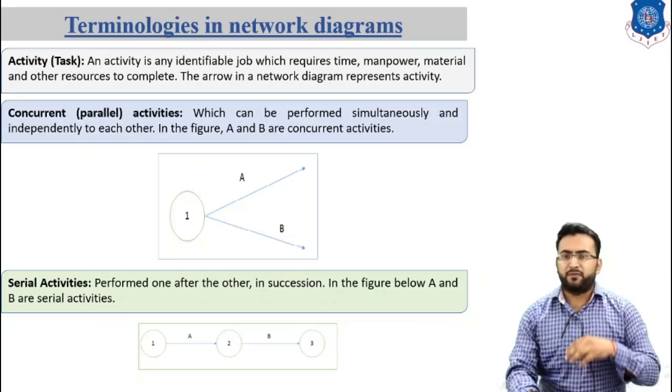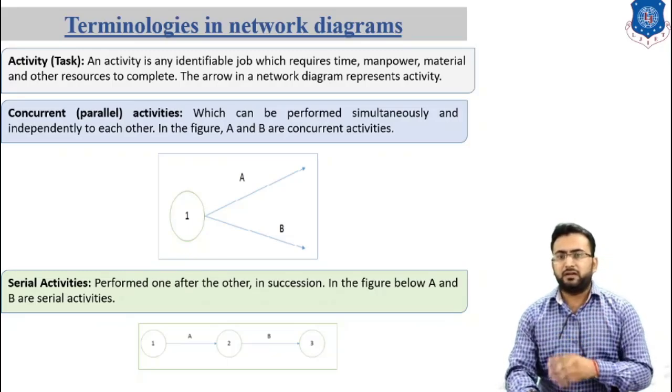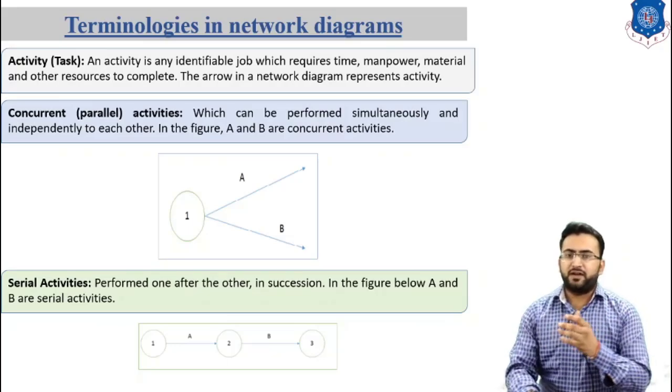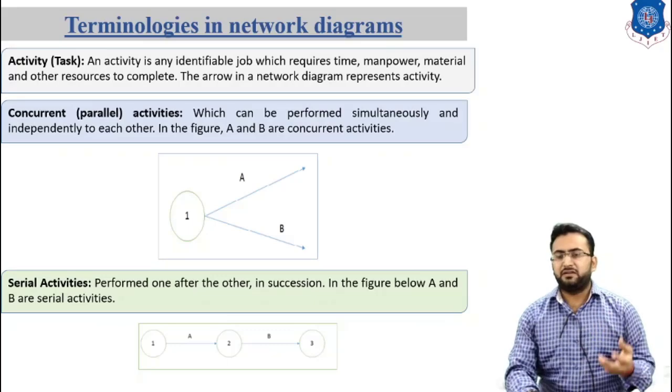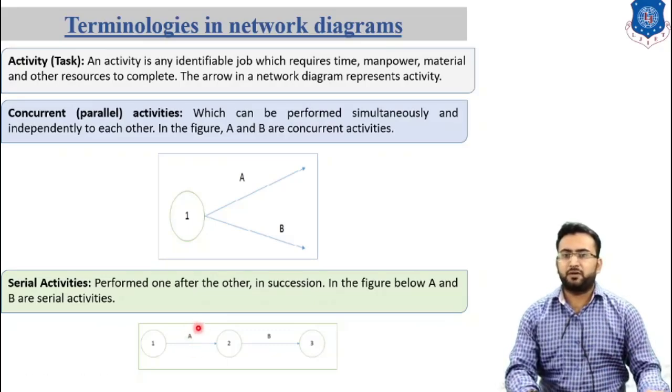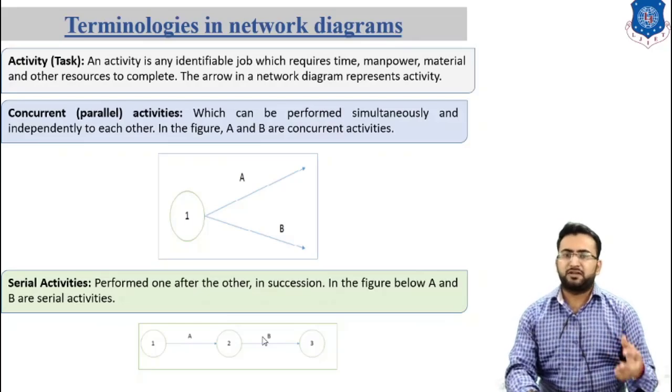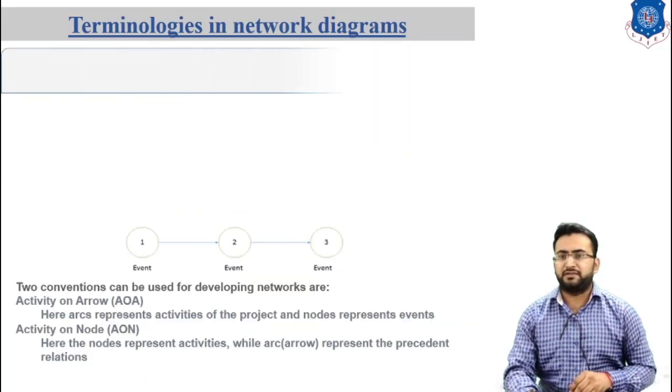Now let's talk about series activity. Series activities are performed one after another, on completion of one activity. In the figure below, A and B are series activities. So after completion of activity A, activity B starts. This type of activity is known as a series activity.